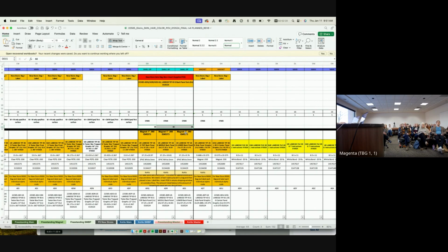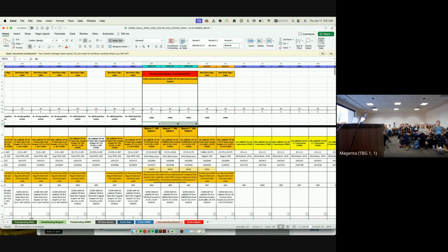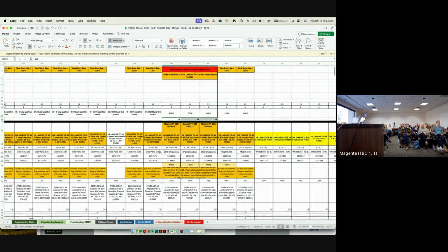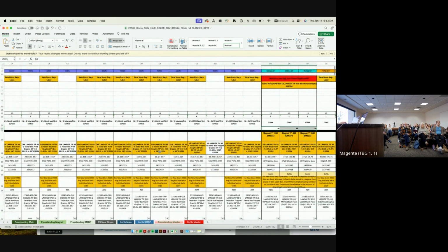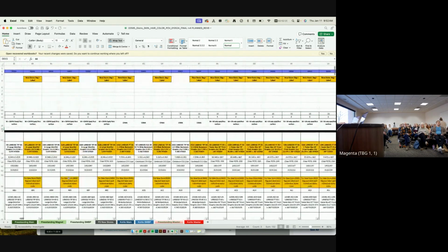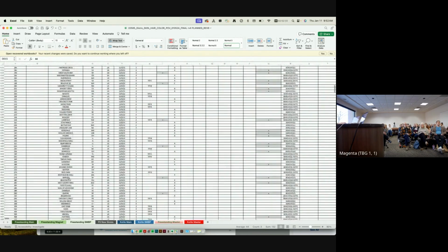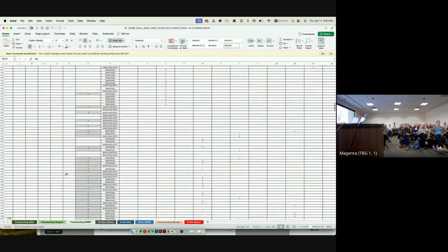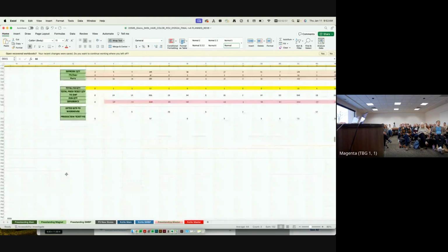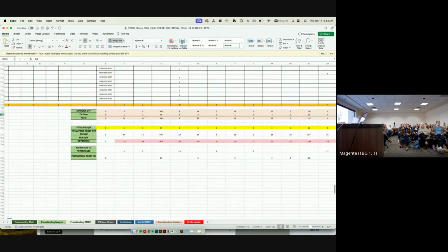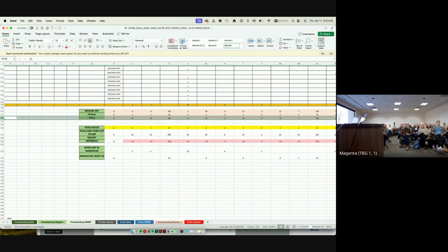So by being able to create additional rows to utilize this specific document to estimate from, we're actually cutting down slightly on the amount of work that we have to do. Then I'm going to scroll all the way down here and note that whenever we're doing an estimate, we are using this specific line. This is our Perry quantity. So really what it does is it takes the sum of our store number lines, which would be our Sephora quantity down here, and it adds our 7% overs.